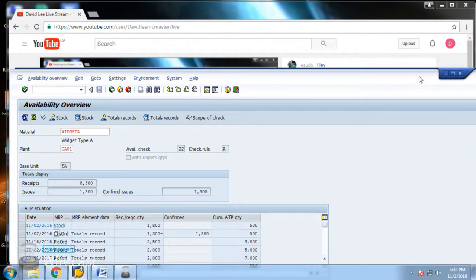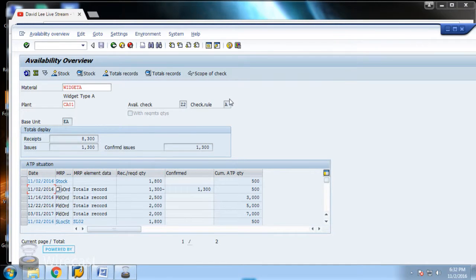So to answer that question, how long it would take? I will give you an example. This particular system, along with things like purchasing, sales, capacity planning, and production planning, is going to take about a year for a company of about 250 employees. And I used a team of 5 to accomplish that. Of course, that's going to vary a wide amount depending on how big your company is, how many employees you have, and how complicated your business processes are.